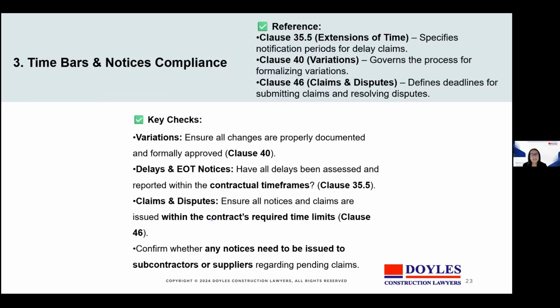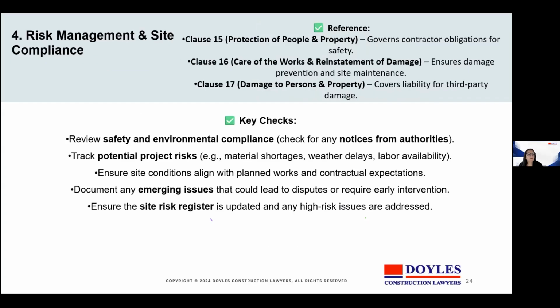Key checks include ensuring all changes are properly documented and formally approved, checking whether all delays have been assessed and reported within the contractual timeframes, and confirming whether any notices need to be issued to subcontractors or suppliers regarding pending claims. Number 4, risk management and site compliance.